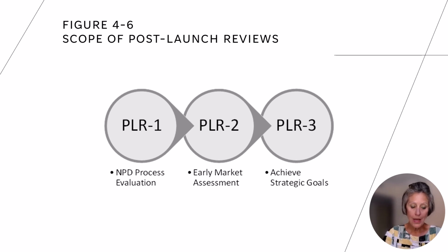When the product has a long sales cycle, you should not skip the PLR2. In addition to evaluating what went well and opportunities for improvement, these later post-launch reviews examine customer acceptance, sales revenue, and other market elements for the new product.